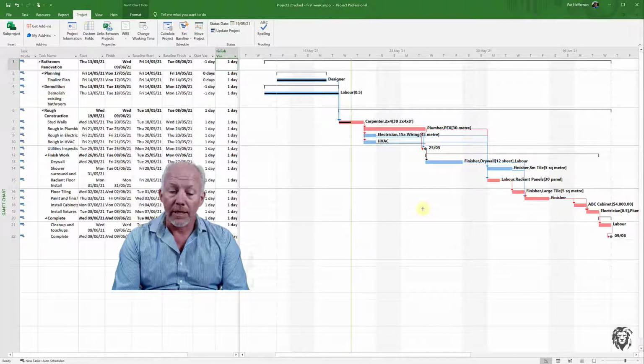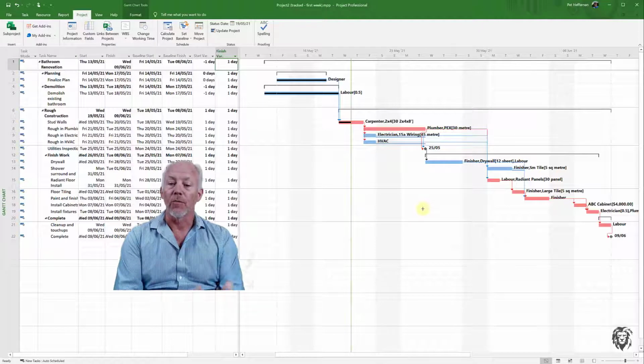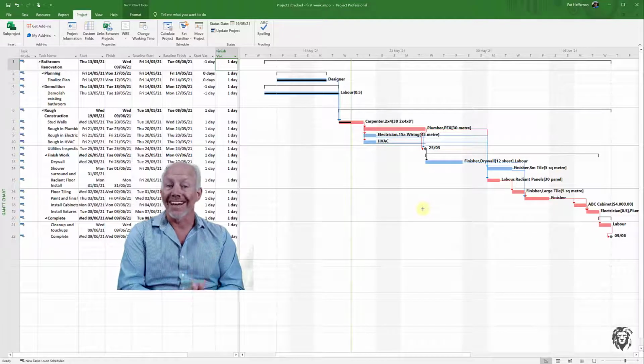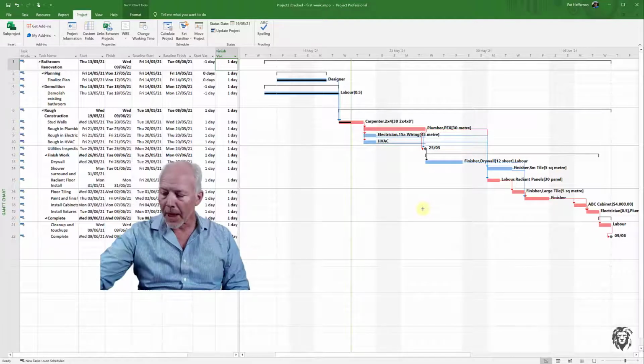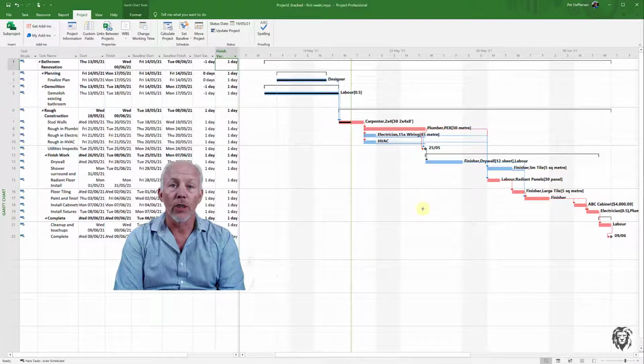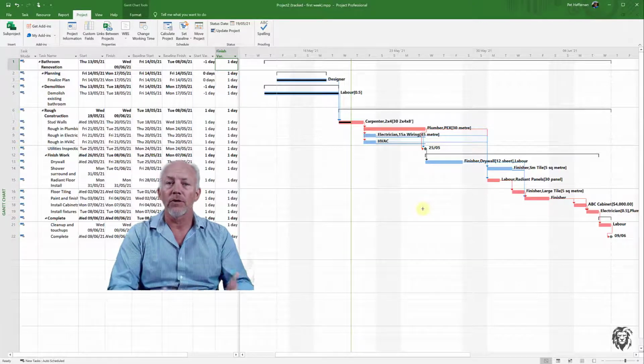Now, the client has promised me that they will make an immediate decision, if we're within their range of acceptable. So when I consider this, as far as the impact on the time schedule, I'm going to consider it for implementation anytime after today or starting today. Now, if you had a client that was not as quick, or you couldn't anticipate that they would be able to give you an immediate decision as to whether to go ahead with the change order or not, then you're probably going to have to build in some extra time before you would consider starting to work on the issues associated with it.